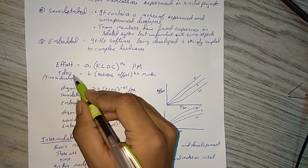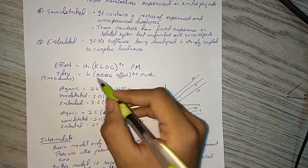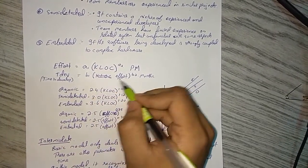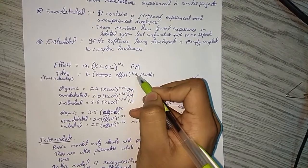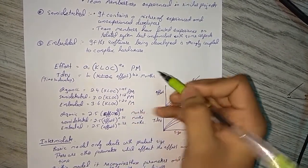And T-develop, time to develop, that is b1 times effort raised to b2, in months.